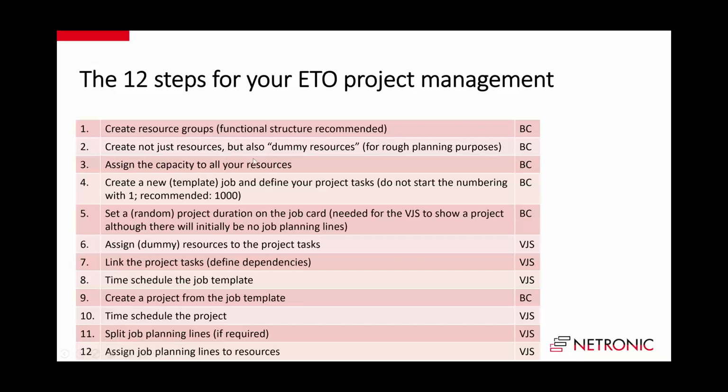Then we need to have the capacity. So you need to assign the capacity to your resources. And then you're good on the capacity side of things. So then you can create a new job. And I would start with creating a template and define your project tasks.